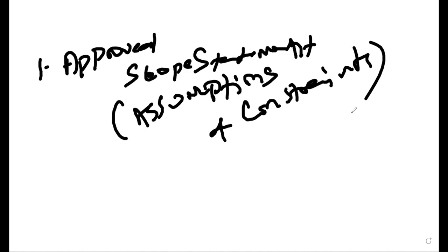What happened? Your assumption which you made 4 weeks back or 4 months back is proven false. It will increase the risk or decrease the risk? Increase the risk. Always, it will increase the risk. If your assumption is proven true, then there will be no risk. If the assumption which you made long back is proven false, that will be increasing a lot of risk.